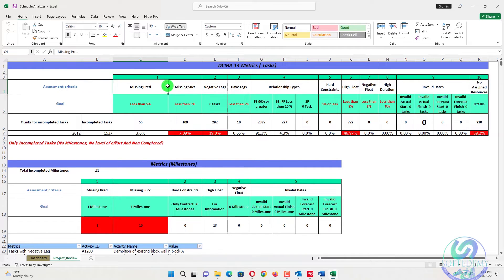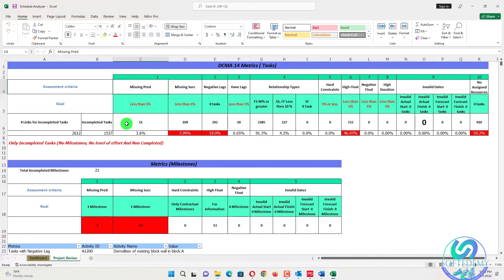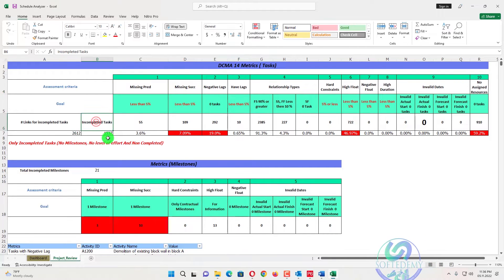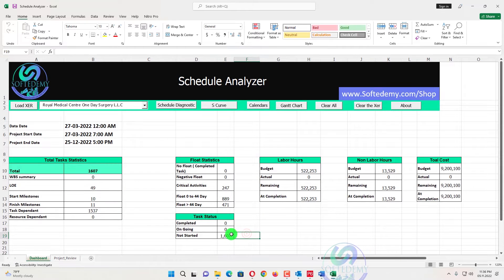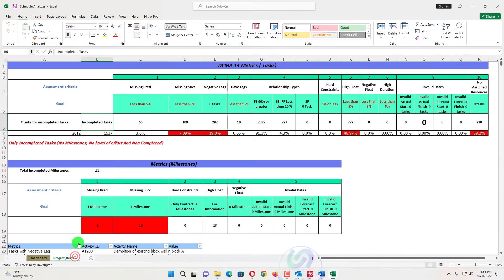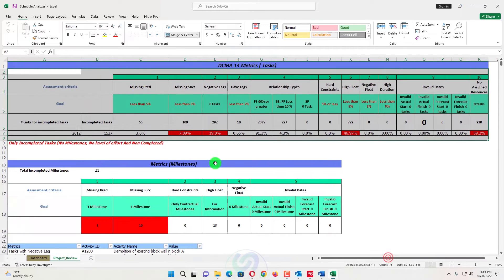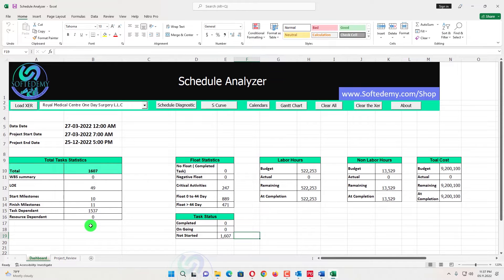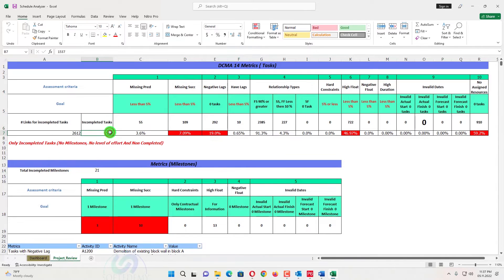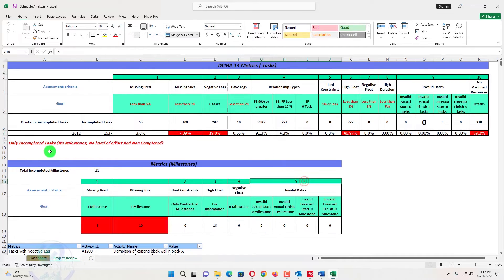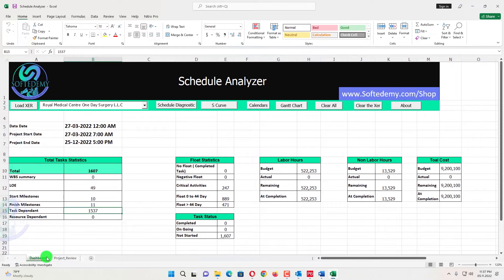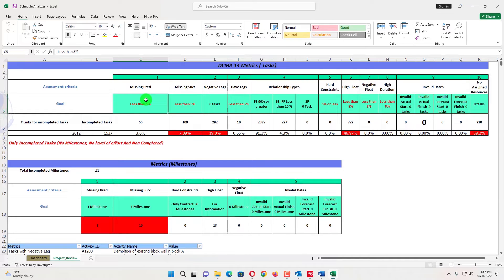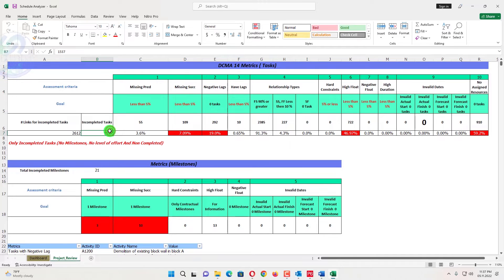It's written here missing PD, that missing PD means missing predecessors. So the missing predecessor should be less than 5%. Also, you can see the detail: number of links for incomplete activities 2612, incomplete activities are 15,137, and total activities are 1,167. So that one whole, that one based on task dependent. So the task dependent activities are less than that one. So we will see here task dependent are 1,537. So that one area is for the task dependent and that area is for the milestone. So this is the links, links are the relationships. You can see here a predecessor and successor are relationships.